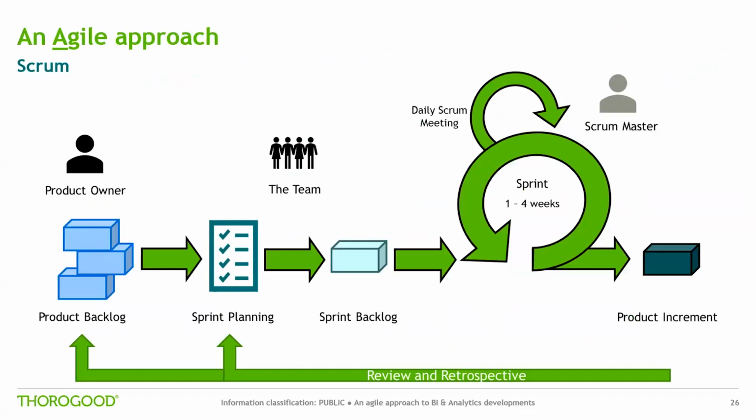The Scrum approach consists of specific roles, artifacts, and ceremonies or activities that work together within each sprint cycle. A team typically has between 5 and 9 members, which consists of the development team and 2 additional key roles: the product owner, who holds a vision for the product, and the Scrum Master, who helps the team best use Scrum to build a product.